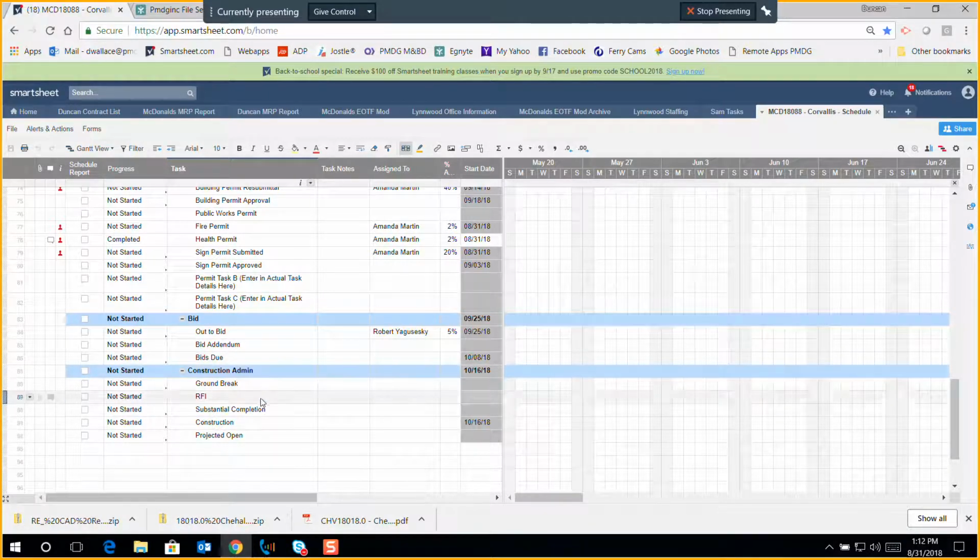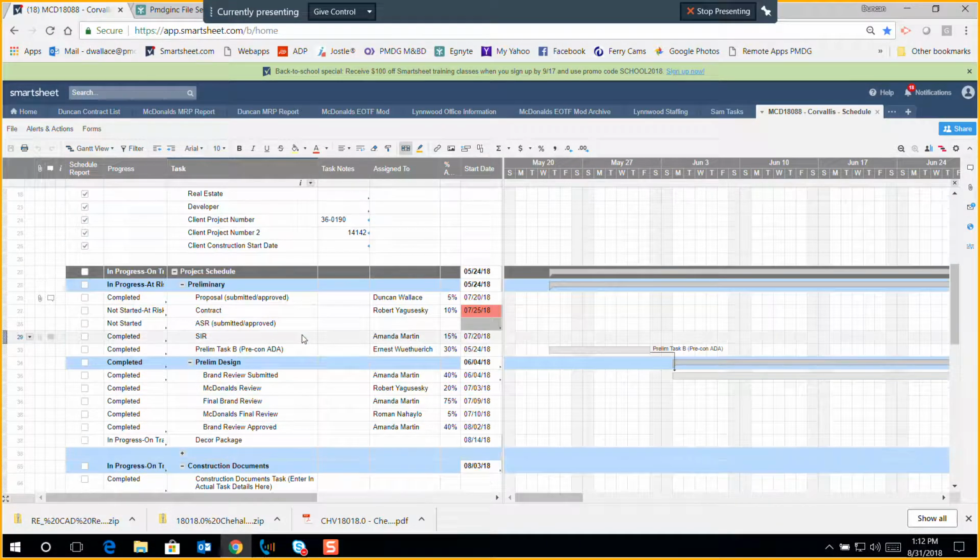I find sometimes personally it's nice for me to have the post-construction ADA identified somewhere, because that gives me a notification that, okay, I can bill 100%. Most of the time when my project's just about done, I bill like 90%, but I hold off on the final billing until that final construction. I actually, when I submit for permit, I bill everything. Oh, do you? Okay.